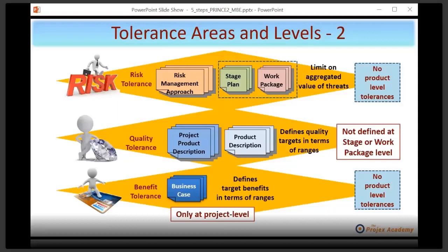That's a disbenefit. What do you do with a benefit? You try and make it so. You work very hard to maximize benefits. What do you do to disbenefits? You work very hard to actually reduce them, hopefully to zero. But you do expect them. A disbenefit is not a risk. It's something that's going to happen as a consequence of getting those important benefits.